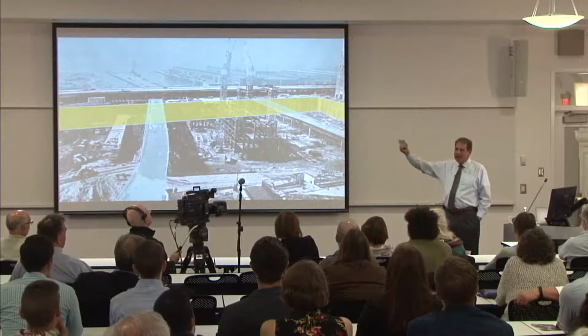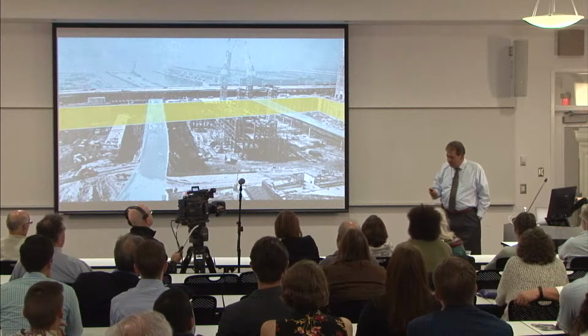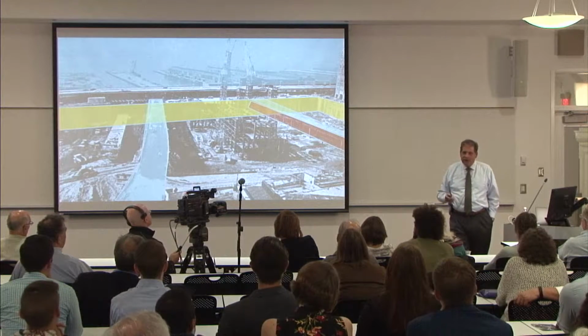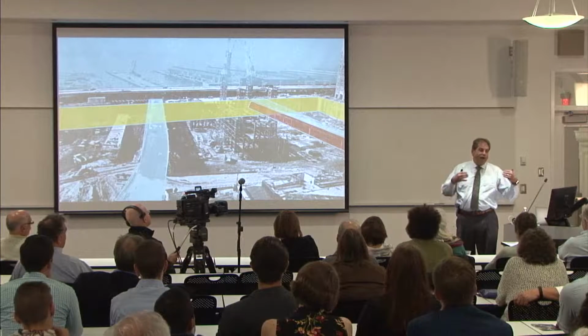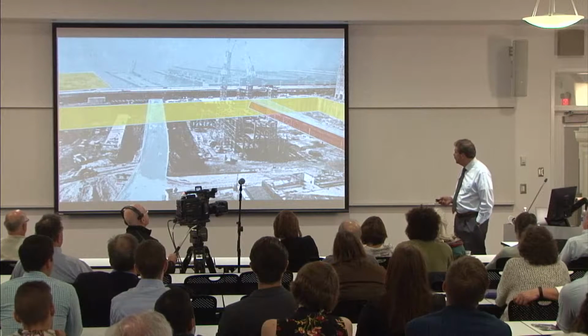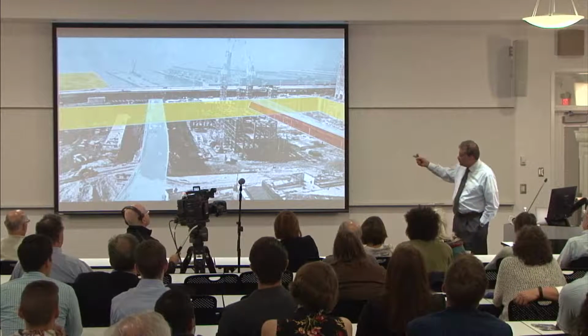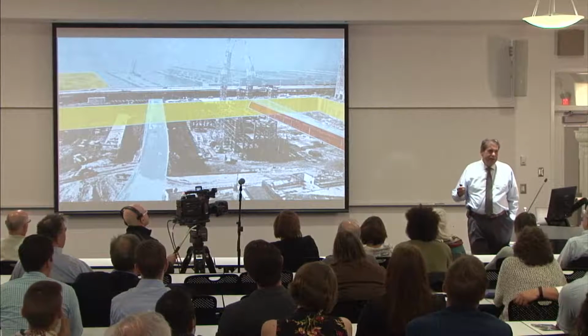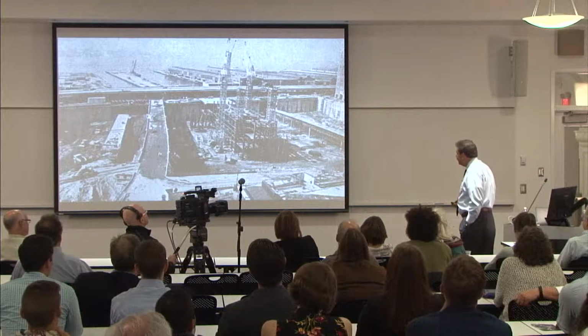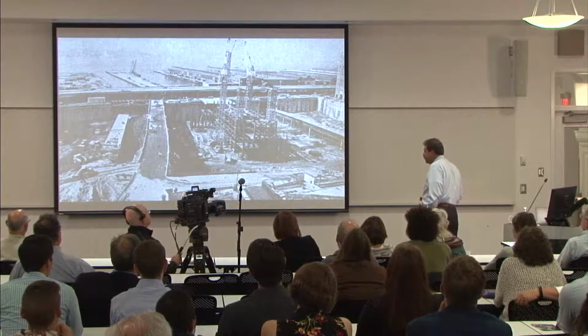Another aspect was there was the railroad, but the railroad has 2 components to it. It comes in one tunnel and goes back to New Jersey through a second tunnel. Not only that, but while they were building the World Trade Center, they had to underpin the railroad and keep it in operation, parallel to what we've been facing in the rebuilding of Ground Zero these last 12 years. And then what happened was that it's a big excavation. That material went into the East River and became Battery Park City. So this is what it was as the World Trade Center was being built.